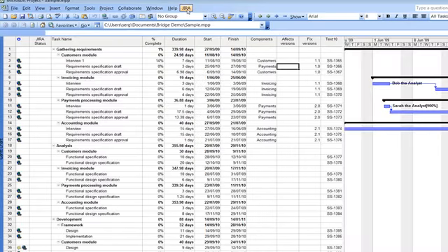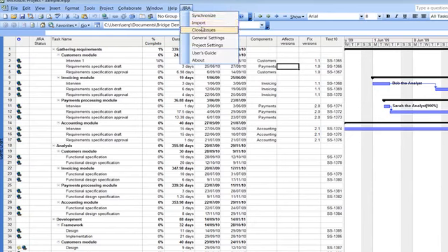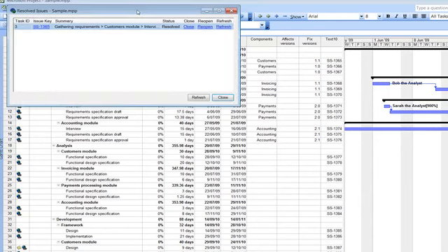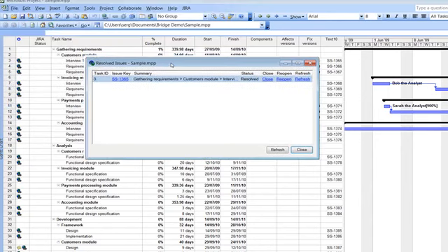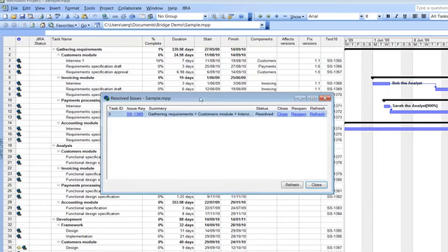And the manager now, having received the email notification from JIRA, goes to the close issues dialog box. So at this point, what happens is the bridge checks all the issues associated with the tasks in this project and shows the list of all the resolved issues that are waiting for closing or reopening.